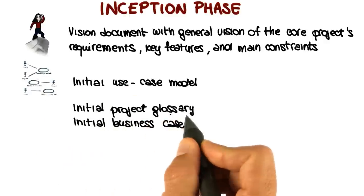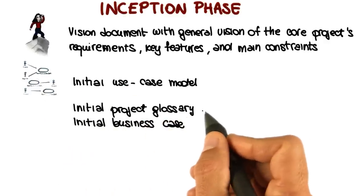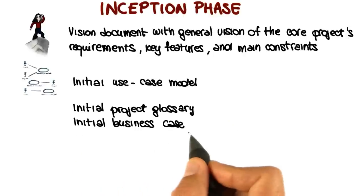Two additional deliverables are the initial project glossary, which describes the main terms used in the project and their meaning, and the initial business case, which includes business context and success criteria.